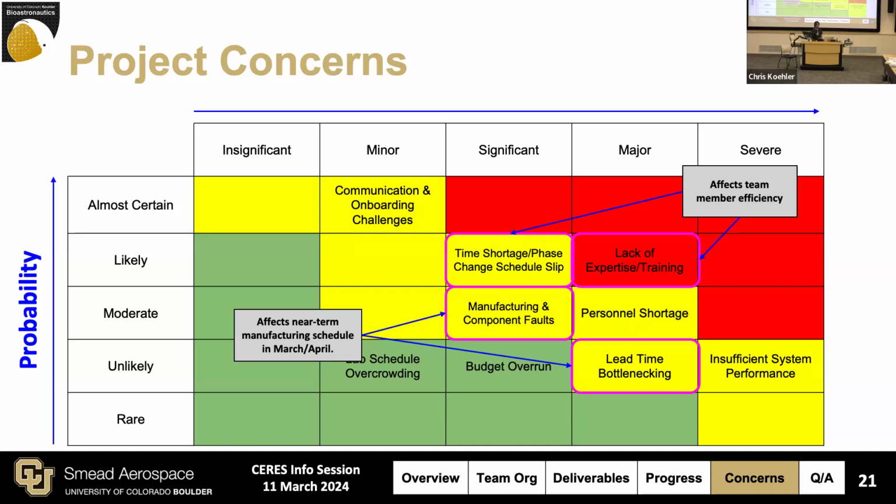We're gonna start ordering all of our pieces and we hope to have them in-house and manufactured by April 8th. So that's a lot of quick turnover there. So we've vetted a lot of short lead time suppliers to try to get our quickest shipping so we can assemble the fastest. But the components that we're manufacturing in-house, especially in the machine shop here, where we have to queue up with other projects, basically, we've ordered those materials early and are going to submit them now. So we have that little bit of time buffer.